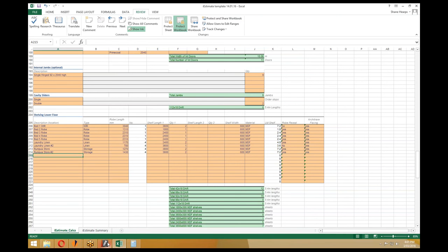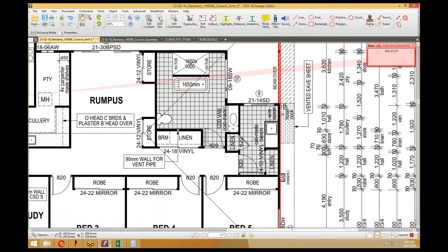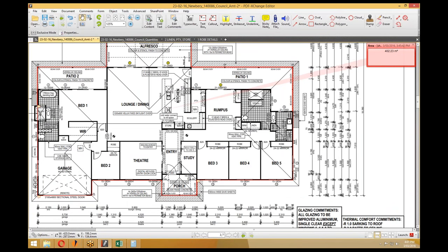Now you could choose the closest size sheet, I guess, to reduce the number of cuts a carpenter has to do, but most of our trades on our Databuild rates are working on set square meter rates for a home. So whilst they may have to do a little bit more work, we're saving significant amounts of money by buying one 3600 versus buying two 1800s, where the cost difference between them might be $2 or $3, but you don't have to buy both.